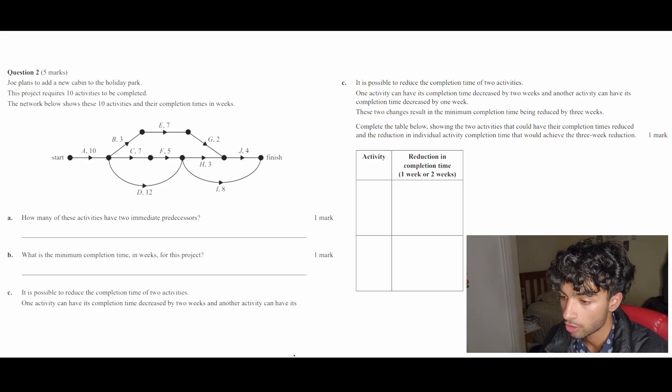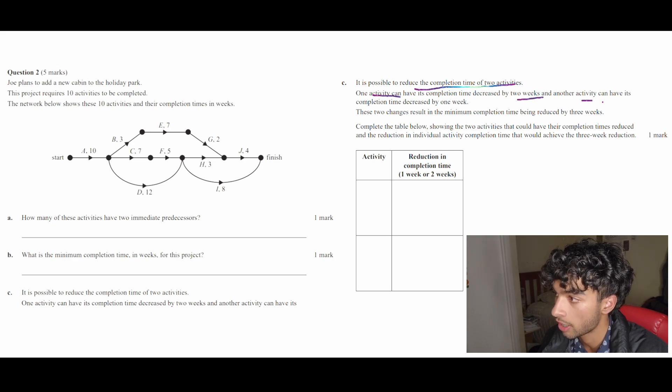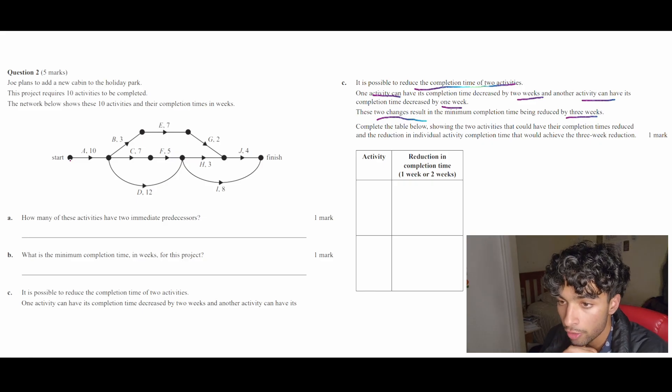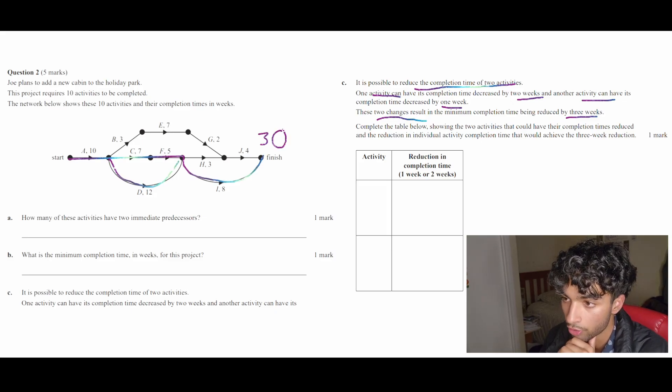Now we have part C of the question, which is probably the hardest part because it's involving crashing, which is a bit hard to look at. Well, it's still fine. So we can reduce the completion time of two activities. One can be reduced by two weeks and the other can be reduced by one week. These two changes result in the overall project being reduced by three weeks. So if we remember what our critical path was, which is the longest path, it goes here and then here and then here. And it also goes around here and that gives us a total of 30 weeks.